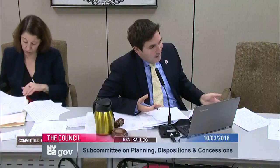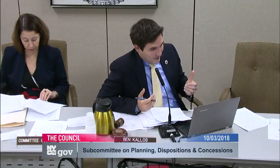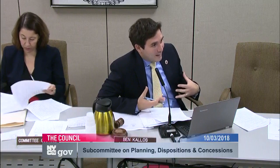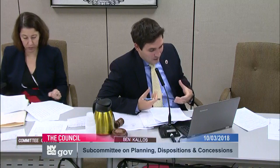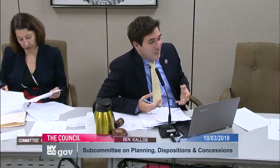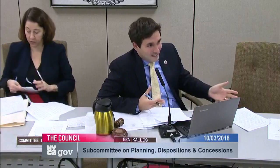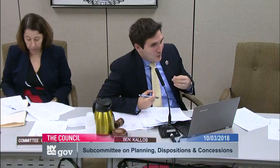If HPD had to come back after the initial transfer, after the initial closing, and you had 2 years to get in the ground in order to keep the Article 11, could we add that in to say that when HPD gives an Article 11 or some other, or even UDAP, that whoever gets it has to get into the ground within 2 years? And then after that two-year mark, they get another 2 to 3 years to finish the project. Not that Habitat needed it because they went really quick. But, like, could we have steps so that we don't get stuck with somebody holding it?